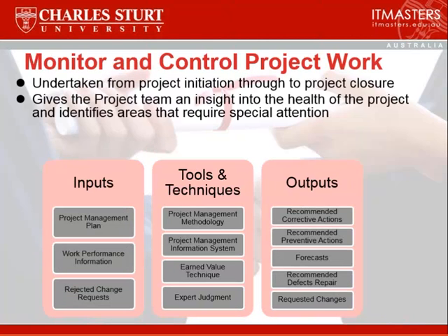Monitor and control project work. What you're monitoring is one aspect and controlling is the other. Monitoring is you're measuring performance. What's actually happening? Are we doing well? Are we working to plan? If we're not working to plan, what corrective action do we need to control things? So monitoring is checking, and control is doing something about it. So you're taking corrective action. Again, we've got the inputs included here, tools and techniques that we need to apply to monitor and control, and the outputs include things like recommended corrective action, preventative action, forecasting where we're heading, etc., etc.